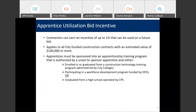Apprentice utilization bid incentive. The bid incentives we've discussed so far involve applying at the time of bid, and then we apply the incentives that you are eligible for to your bid on that particular project. For these next two incentives, you apply at the time of bid and earn your incentive through your performance on the contract. Then you get an earned credit certificate that you can use to be applied on a future bid. These two incentives are very similar in that they deal with the utilization of apprentices.